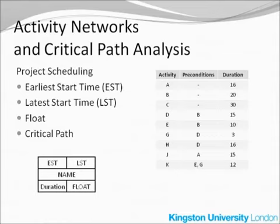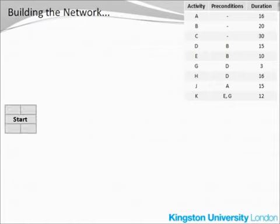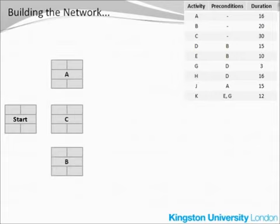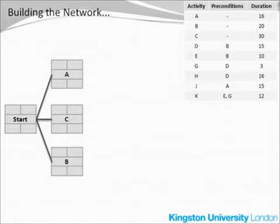Let's start with our drawing. I have put the table of activities conveniently in the corner of the screen, and I can start building the network by putting the start node on the left-hand side. Now we can choose all those activities that have no preconditions — these are activities A, B, and C. We simply put them next to the start node. The lines indicate that each of the activities A, B, and C may follow immediately after the start node. We should use arrows here, but most usually we simply put striped lines, and we assume that the flow of activities goes either from left to right, or top to bottom.